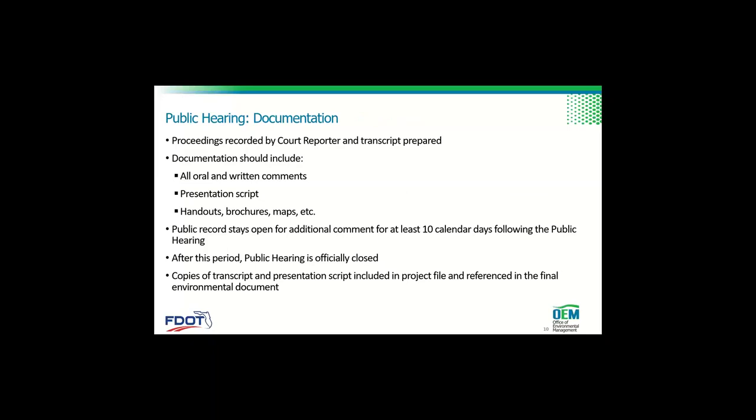Traditionally, we have a court reporter who comes to the public hearing and prepares a transcript. Documentation will include all the oral and written comments that you've received at the meeting and in other ways. The presentation script is included in the documentation, and any handouts, brochures, maps, boards, pictures of the boards, and those kinds of things should all be included in your documentation.